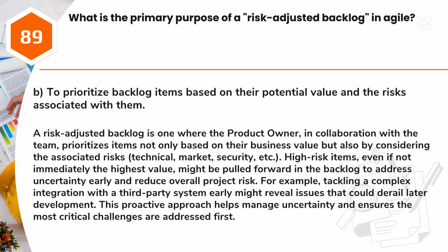Answer: B. To prioritize backlog items based on their potential value and the risks associated with them. A risk-adjusted backlog is one where the product owner, in collaboration with the team, prioritizes items not only based on their business value but also by considering the associated risks: technical, market, security, etc.